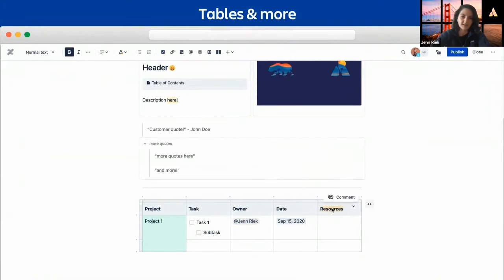The most common way I see statuses used at Atlassian is not started, in progress, at risk, and done. But people also mark which quarters they expect to have something done, or just as numbers, which will show up better on a page than a regular numbered list.